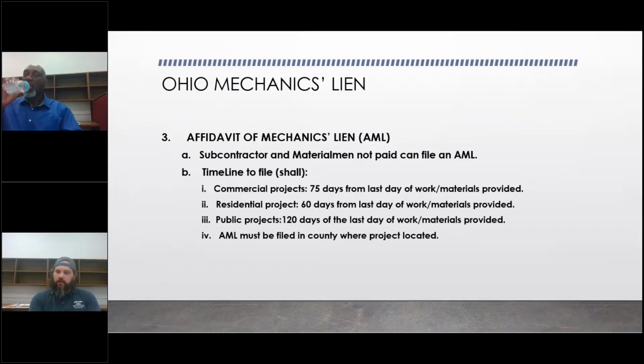I've also run into it where, to collect checks on a lot of our state projects when we're a subcontractor, we have lien waiver documents that coincide with receiving checks and payments. So, all the good general contractors out there are making sure that their subcontractors are paying their, for us, it's usually equipment rental, or I'm trying to think of anybody else that we would subcontract, but we have to sign off on a lien waiver. So I, as me or as my company, take on the responsibility to make sure that my subs are paid with that corresponding check that comes across. It all goes hand in hand with the conversation, the lien waivers, and how that plays into getting paid.